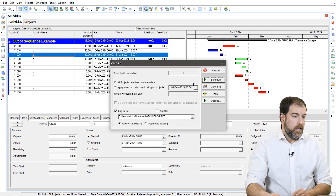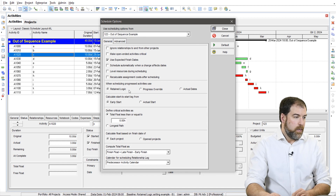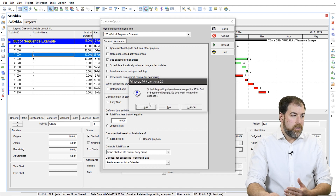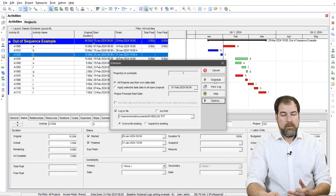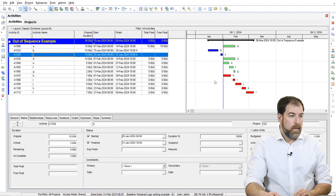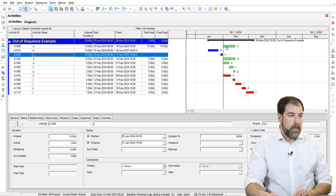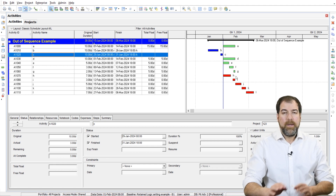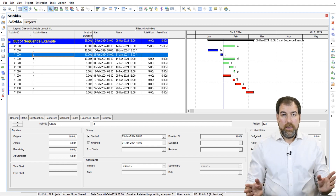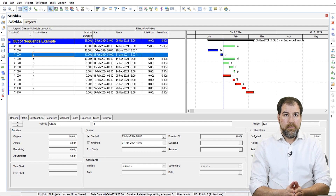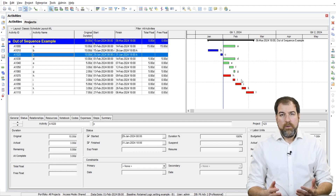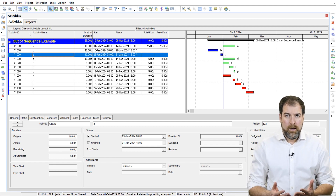Another option we can look at is Progress Override in the scheduling options. What is Progress Override? Progress Override says: if I progress things out of sequence, don't worry about it — we're okay with it. Watch what happens when I use Progress Override: A is still here but it's no longer critical, and all the other activities that depended on A are ignored. With Progress Override, the relationships are dropped by P6 — it takes all the activities that are next up, lines them up, and says this is all the stuff you've got to do. It ignores any relationships and is no longer trying to keep them alive.